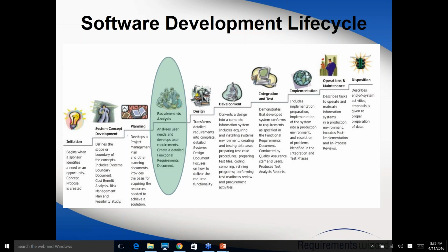So all the cost is basically around the humans. So to answer your question, yes, what we do as a PM is we keep a buffer of like 20-30% so that in case of these kinds of situations, we are safe.